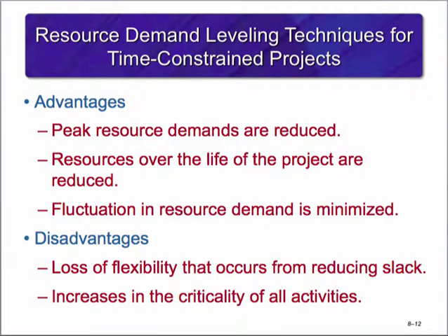When the resource demand leveling technique is used, it provides the following benefits for the project. Peak resource demands are reduced. Resources over the life of the project are reduced. Fluctuation in resource demand is minimized. However, it also has a couple disadvantages for the project: a loss of flexibility that occurs from reducing slack, and increases in the criticality of all activities.